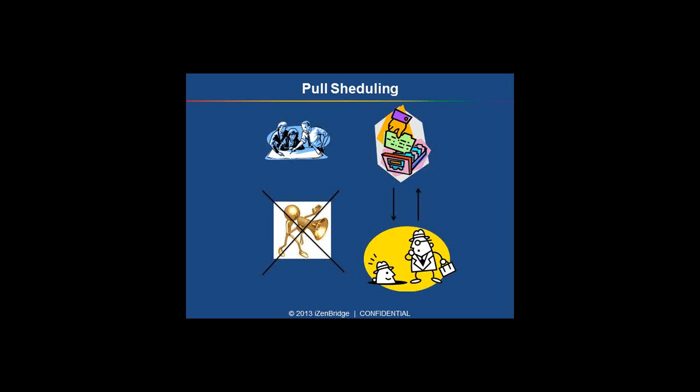Now these cards can be stacked, and from your team, you expect that they will keep picking the card and start doing the work as per the given workflow. If they face any problem, they may hold one task and pick up the next from the inventory or from the pending list which they have. They don't need to be communicating again and again to the manager in order to know what needs to be done when they face any uncertainty.